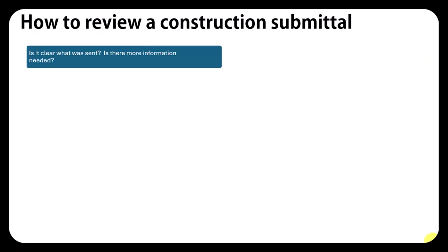So we're going to stick with our example of plumbing fixtures. You have sinks, you have toilets, you have faucets, you have valves, you have different types of pipe. Are they missing anything? So if your subcontractor sends you, here's the submittal for my tub and nothing else, that's probably not worth submitting unless there's a reason to get that one approved first. Maybe your tub is a specialty item that takes 6 months to fabricate. If so, definitely get that submitted as soon as possible. If not, send it back to the subcontractor and say, that's great.